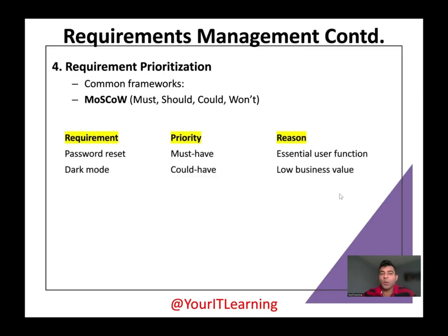So in this case, the requirement is password reset. This is a must have, like we need this one. The reason is it's an essential user function. Dark mode, when you go onto the page, the mode changes from dark to white. Could have, it's a low business value.